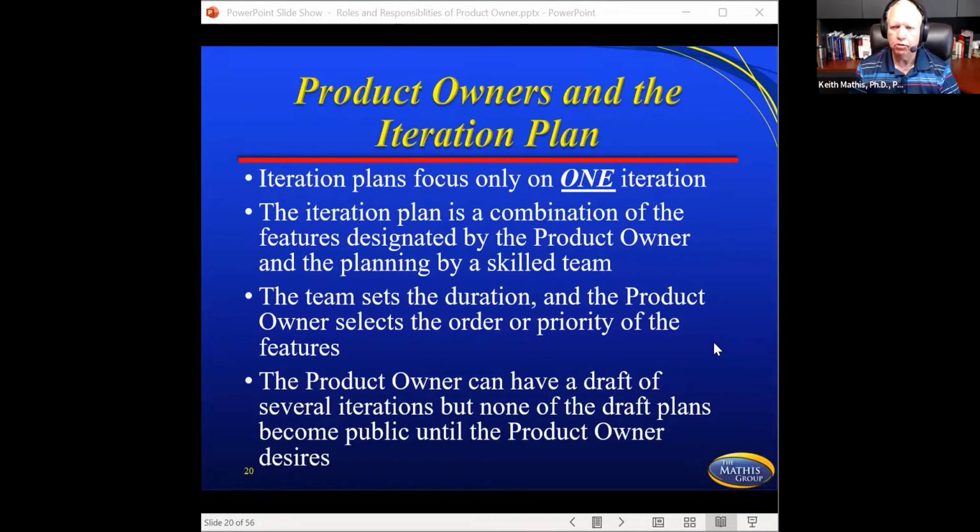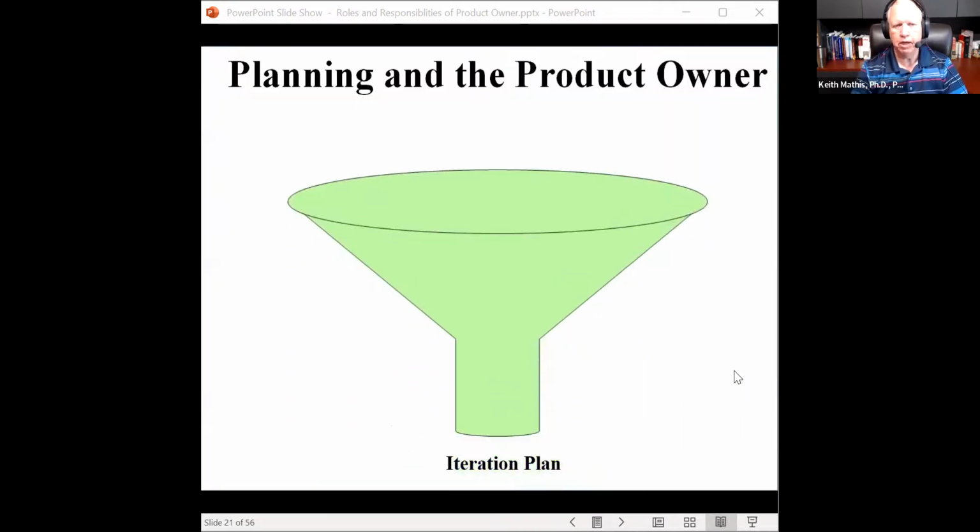And so your product owner will find themselves drafting the next several iterations as they're going through. But it's not locked in. So it's not a draft that everybody and his dead dog is signing off on. It's not that formal. They've just drafted that in these next 3 iterations, here's what they think it's going to take. And so if the team finishes earlier or the customer changes their mind, then they're constantly reshuffling them until they actually hand it off to the team. And then when they hand it off to the team, now it's actually a work plan for them to be able to finish and for them to be able to work on.